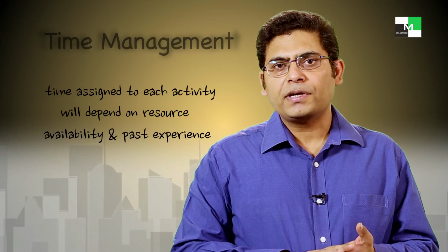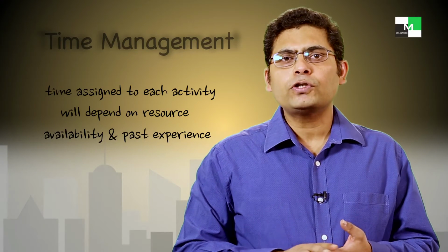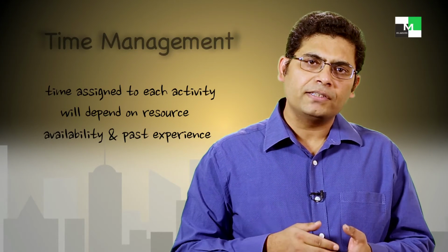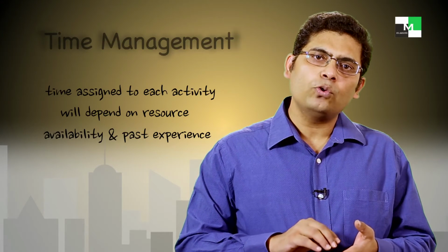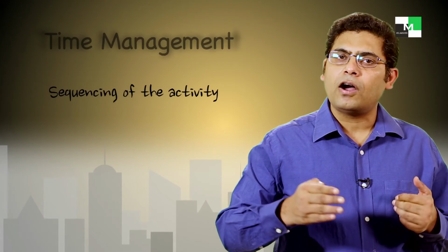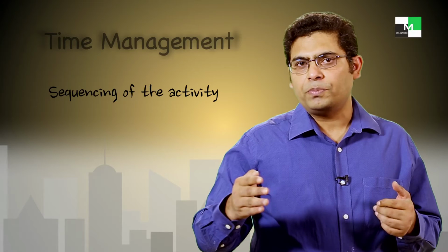Depending upon resource availability and also based on past experience, we assign time to each of the activities. We also sequence the activities, because there could be certain activities which can be done only after the first activity is complete, and hence there would be a sequencing of activities that needs to be done.